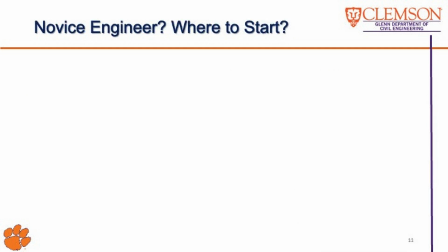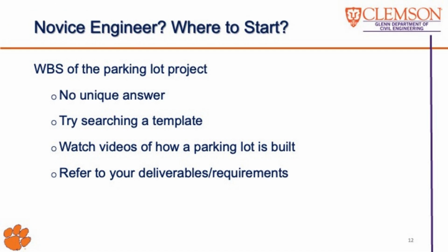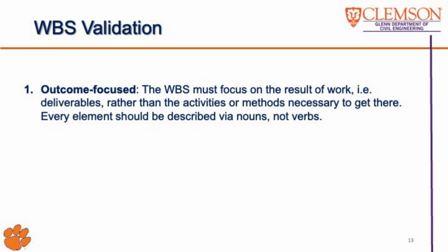If you are a novice engineer without experience, but are tasked with developing a project WBS, where should you begin? Well, you should keep in mind that creating a WBS is more of an art than a science, and there is no single correct approach. Developing a good WBS requires significant experience. You can start by looking for templates or reviewing the WBS from similar projects. Watching videos on how a parking lot is constructed can also help you understand the necessary tasks. Most importantly, be sure to review the project drawings and requirements, as these will guide you in identifying the required deliverables for the project. After developing a WBS, please keep the following three rules in mind to verify its accuracy.